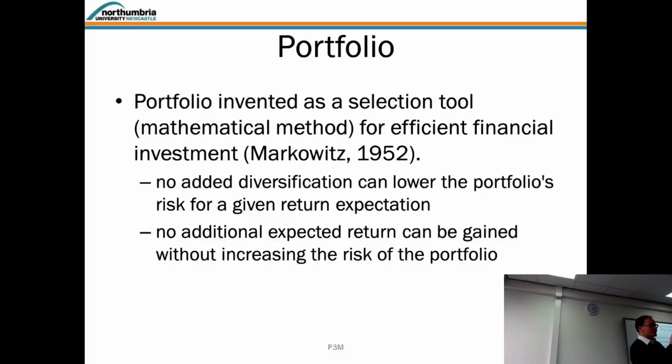If we have a profit margin on those projects, normally estimated depending on what business you do, some run around with 3%. Here we talk about very big projects, but the majority in the UK sits somewhere between 7 and 15%. If you go into the technology, innovation sector and design, you are aiming at 40 to 400%. This is greedy, but okay, never mind. This is where risk comes in proportionally upwards.